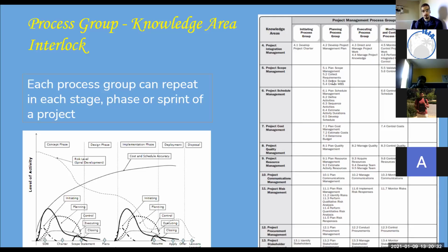So maybe once a week you sit down and review what people have been working on, and you compare it to your scope definition, your document, and then you have a few questions. You go to your technical lead and say, hey, how's this related to that? He says, well, there's some relationship. So are they really close or they're kind of different things? Oh, no, they're different things. Oh, so it looks like the team deviated a bit. Yeah, I think so, right? So that's kind of how you do the scope validation.